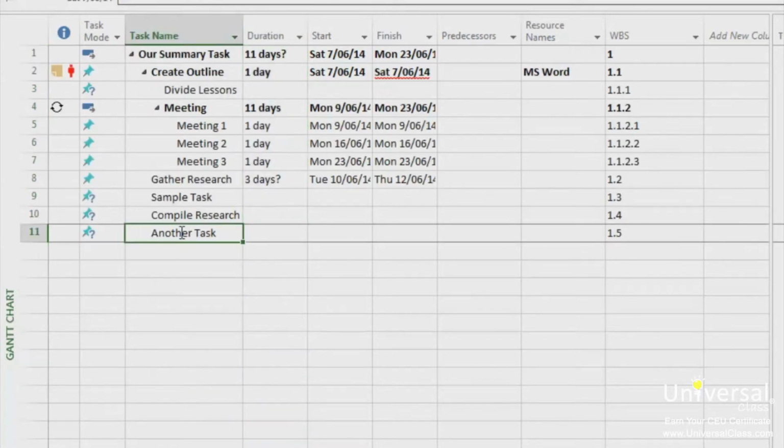Of course, when you have a project, you're going to need the project to be completed by a certain date. With that, you'll have definitions for tasks so that each aspect of the project runs smoothly and on time. In Project, a deadline is a date that you can assign to a task that does not constrain the task timing. When you assign a deadline date to a task, and the task runs past the deadline, Project displays an indicator symbol by the task itself.